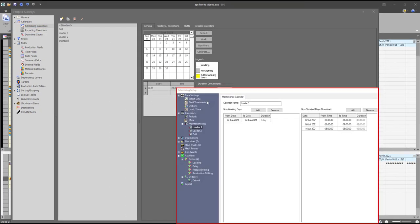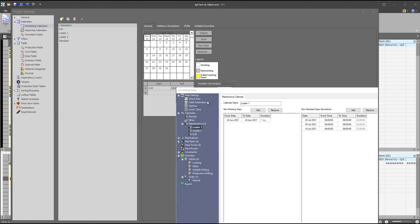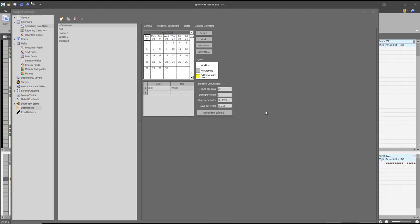The mine and maintenance calendars defined on Studio OP can be found under the scheduling calendar on the project settings on EPS. The mine calendar you can set as your schedule calendar, while the maintenance calendar can be set as a resource calendar.